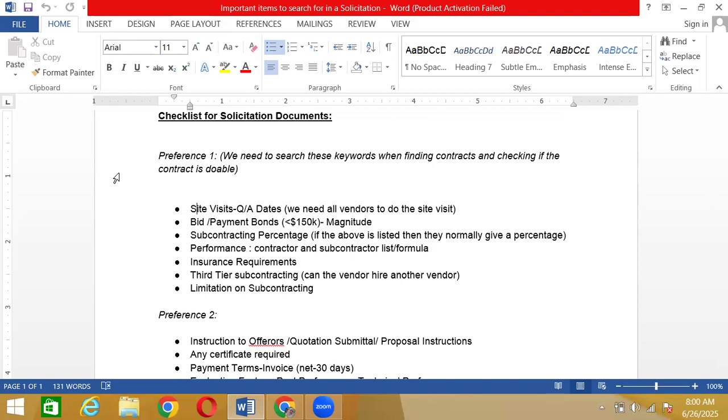All of these contracts are firm fixed price. When we give them the price, we're not allowed to change it at any cost. So site visits are required, so the vendor gives us a price that is accurate, that does not need to be changed at all, now or later. Okay, so two cases: site visit mandated by the government or the client. Then of course we have to do it. Otherwise, our proposal will not be submitted or accepted.